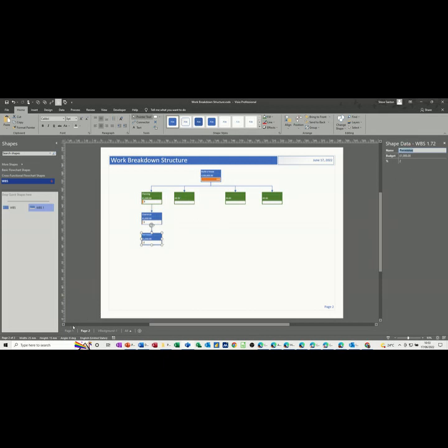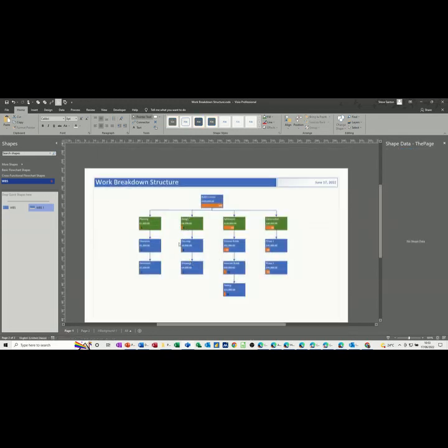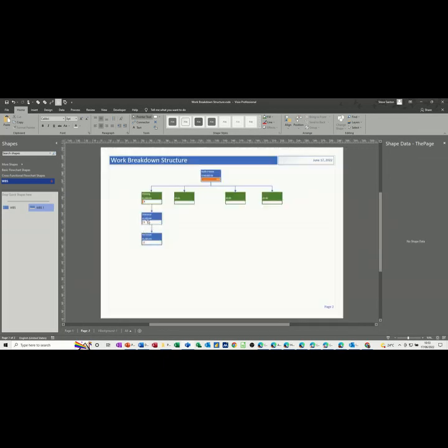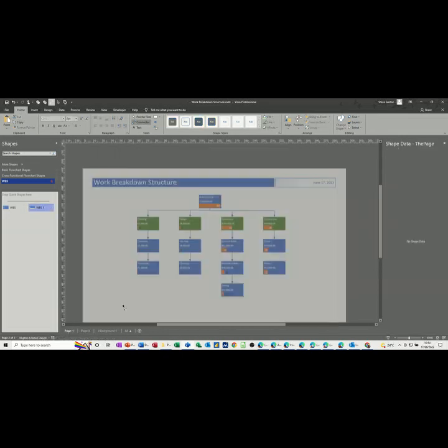So the next one has 2, is it. So this is design, sitemap and drawing. So title is design. The budget for this was 8,000, and again it was just 5% of the total. And then you've got 2 shapes to come out of this. So connector tool back on, drag the shape across, you get the lines lining it up, and then the next one like so. Have a quick look what the titles are.